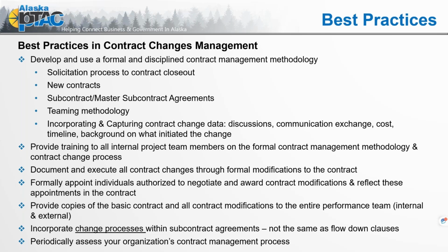Incorporate and capture contract change data: discussions, communication exchange, cost, timeline, and background on what initiated the change. This is the support documentation that we have to build from a verbal conversation. It can include a text or an email where somebody says, let's do this instead, and here's why.